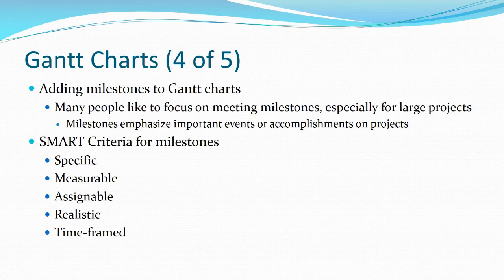So in terms of adding milestones, one of the reasons we put milestones into whether it's a Gantt chart or a report, is we want to show people that they're actually accomplishing something. I think there's a big psychological value to being able to document a milestone. I know this is cliche management speak, but we want milestones to be SMART: specific, measurable, assignable, realistic, and time-related.